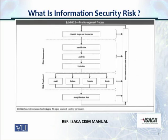After that, we start the risk assessment activity and identify the risks first. At a high level, you identify what the risks are — for example, an earthquake or a fire. Then you analyze each risk independently: what existing controls are in place, what the threats are, what the possible impact is, and what the probability is for each individual risk.